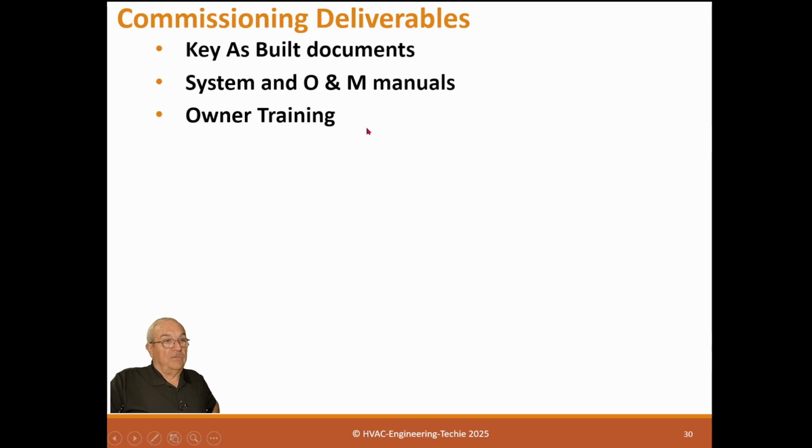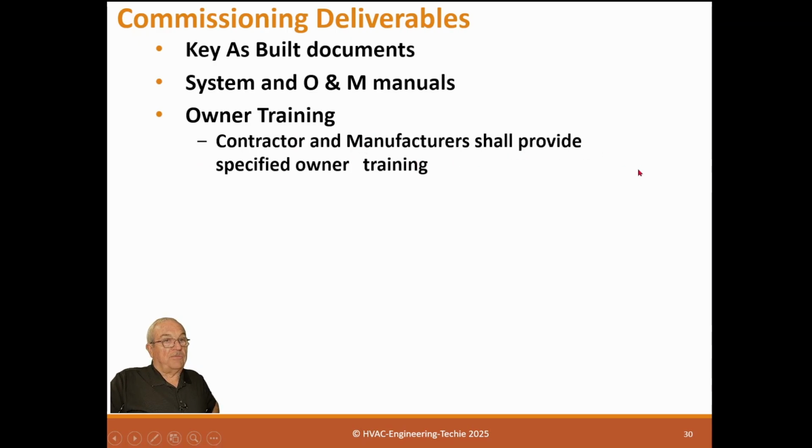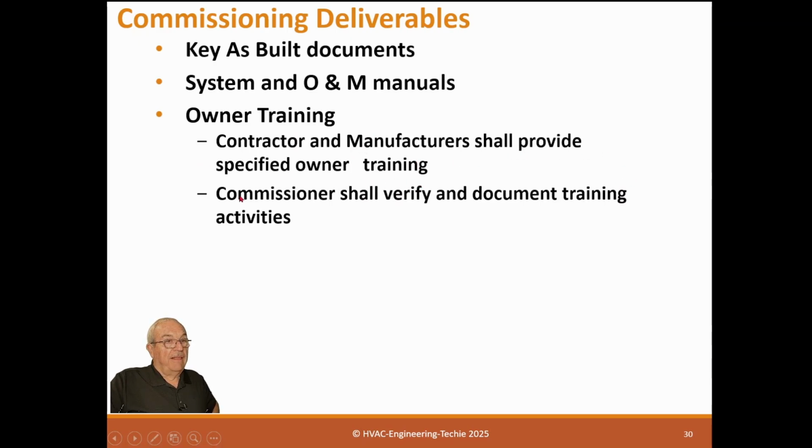Owner training, we need to perform owner training. Contractors and manufacturers provide specific owner training. Commissioners shall verify and document the training activities. As a commissioner, you don't do training, but you may document it. And the documentation may involve videotaping, and it may involve just verifying schedules.